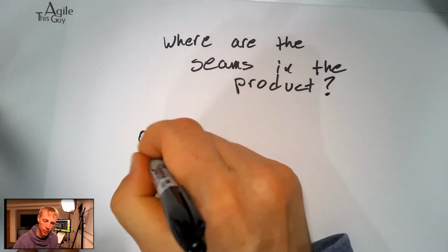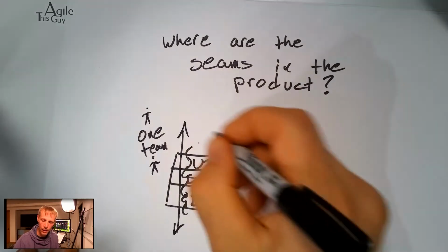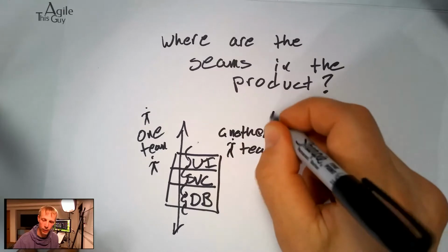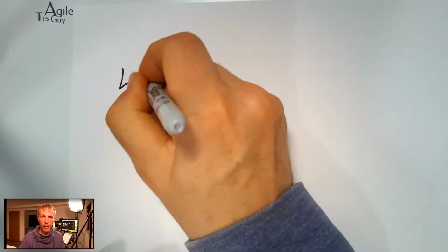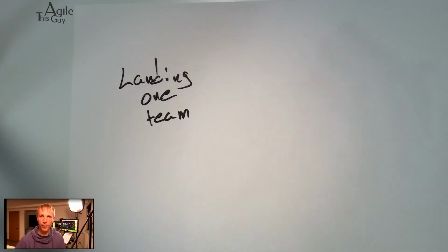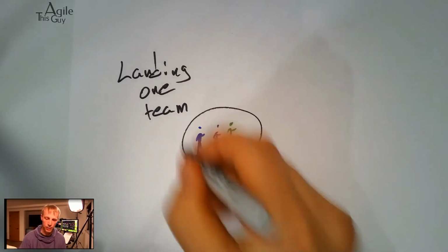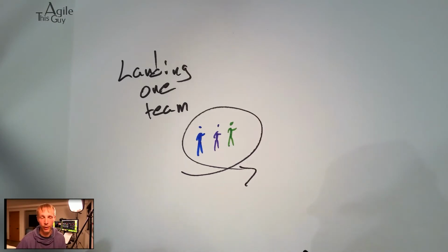and have one team over here working on something end to end, and then have another team over here who is also working things end to end. Let's give this team one person too. To get going, think about landing one team and bring together enough people to create a cross-functional team and let them know as they're getting going that they will intentionally be split apart to expand further in the organization.